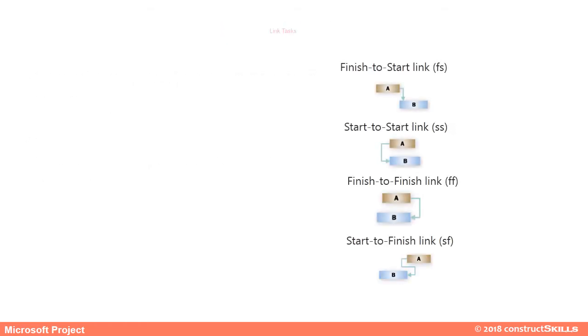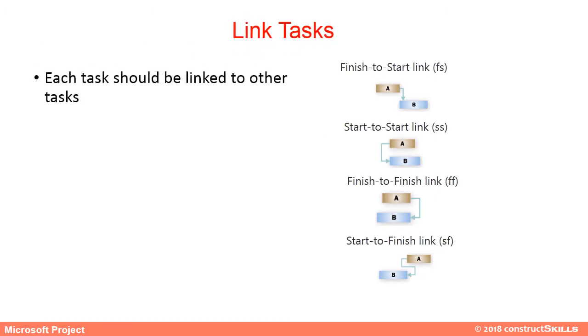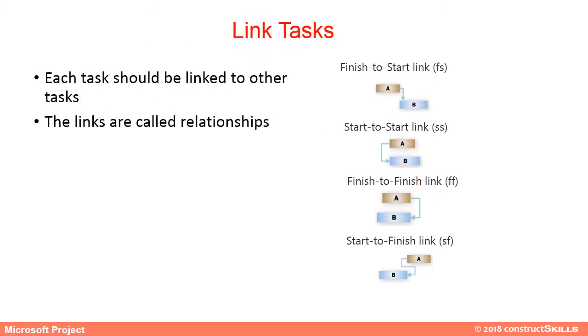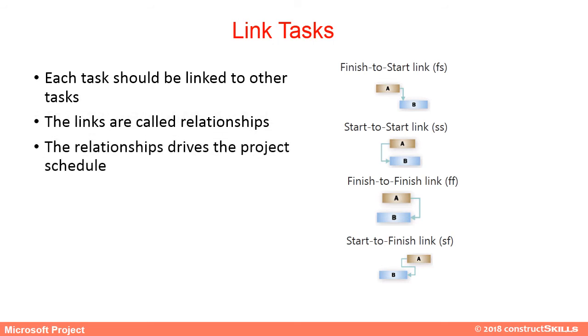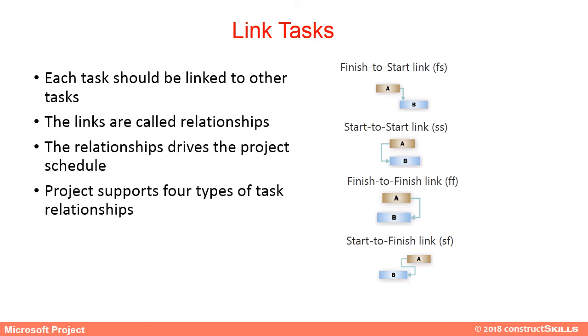In a schedule, each and every task should be linked to other tasks. These links are called relationships, and the relationships drive the project schedule. MS Project supports four types of task relationships.